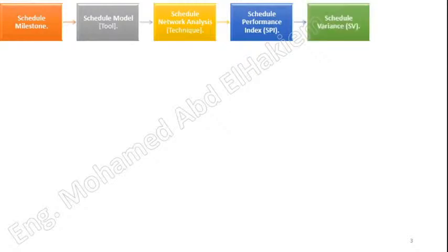Schedule Variance, SV. A measure of schedule performance on a project. It is the algebraic difference between the earned value, EV, and the planned value, PV. SV equals EV minus PV. Scheduled Finish Date, SF. The point in time when work was scheduled to finish on a schedule activity.